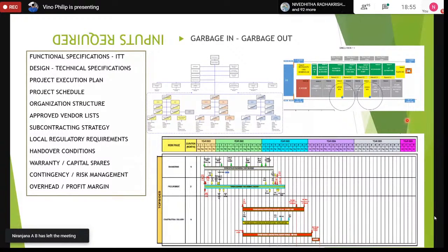execution plan document. The different colors mean engineering in a particular house, fabrication in a particular shipyard, or fabrication in a certain processing facility yard, and also the integration in a certain place. So in this project, let's say, for example, green stands for Brazilian local content modules. Each block is a module.